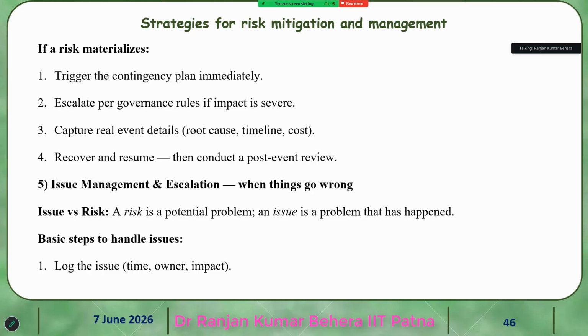Trigger the contingency plan immediately. Then escalate per governance rules if the impact is severe. Capture real event details, root cause, timeline, and cost. And recover and resume. Then conduct a post event review.